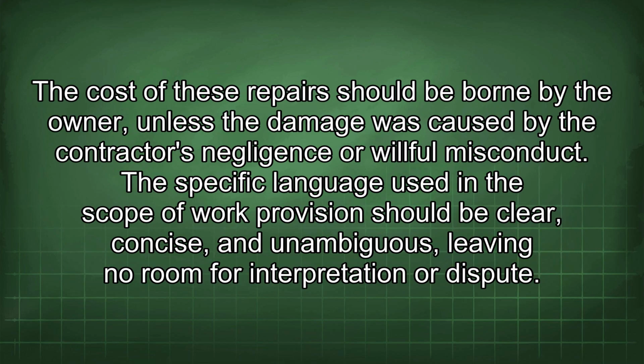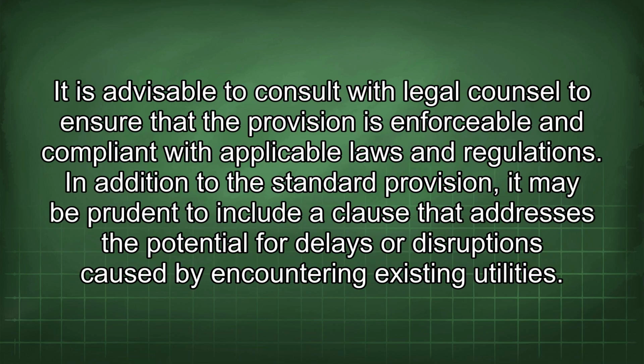The cost of these repairs should be borne by the owner, unless the damage was caused by the contractor's negligence or willful misconduct. The specific language used in the scope of work provision should be clear, concise, and unambiguous, leaving no room for interpretation or dispute. It is advisable to consult with legal counsel to ensure that the provision is enforceable and compliant with applicable laws and regulations.